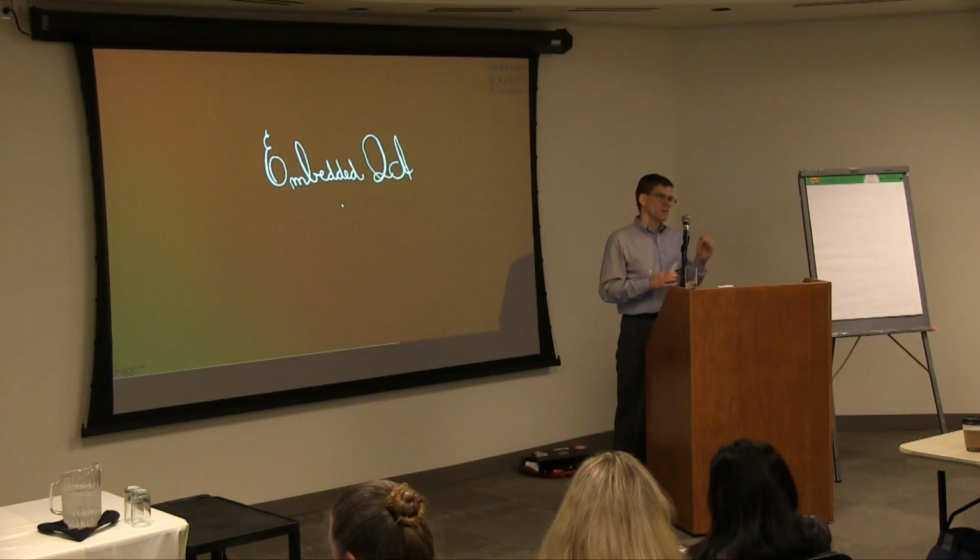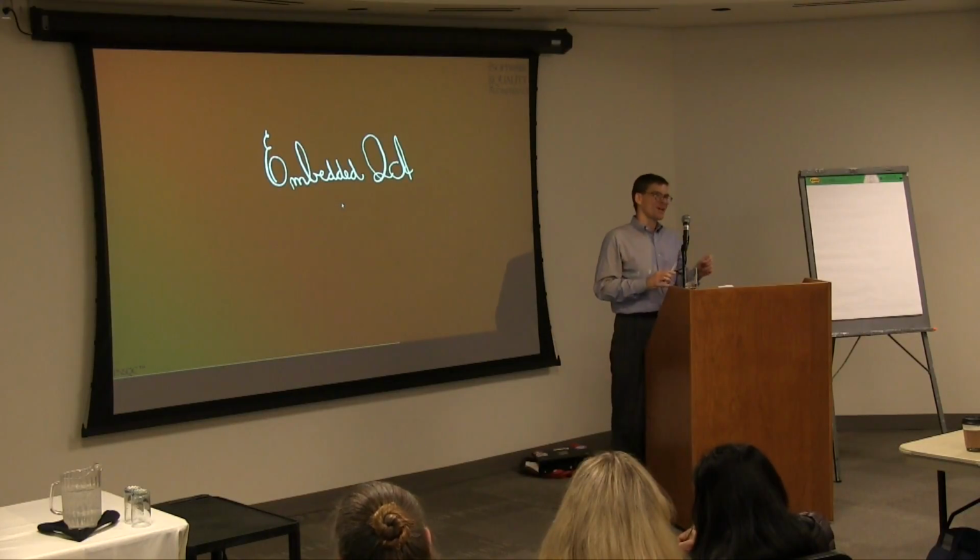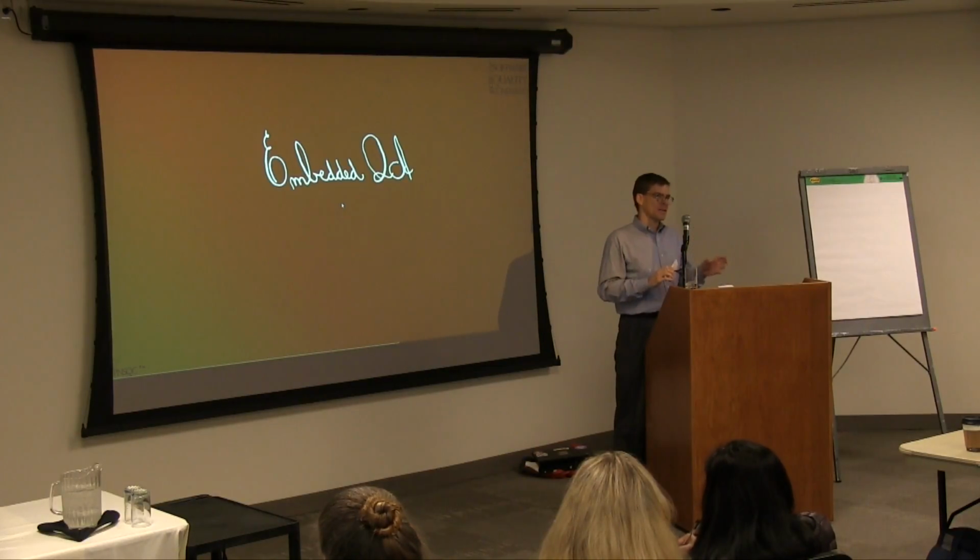The other downside was that there was a mismatch in expectations between the work that QA could do and the resources that were available to do that work. So at the time, our dev to QA ratio was about 7:1. So the QA embeds for those teams were serving multiple teams. You had a single QA person embedded in multiple teams, and those teams said, oh, we have a QA resource, well, you will validate all of the tickets. And this was just not possible.